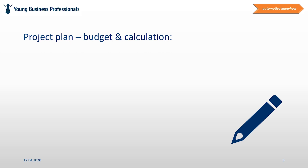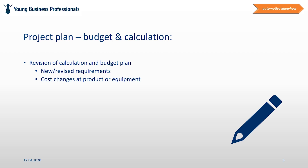Project planning: budget calculation. Once the project plan is done, it's time to review once again if major changes to the product cost calculation and the project budget plan need to be performed. In the best case there is no update needed, but often new requirements from customers come up and it is important to monitor these in order to raise the hand and ask to compensate the change cost accordingly. This is a permanent activity that should be repeated in each of the project phases.